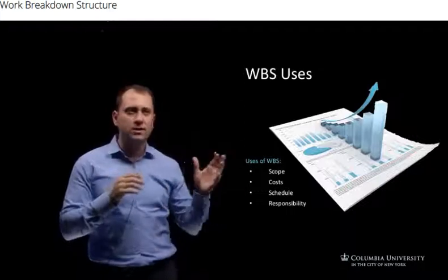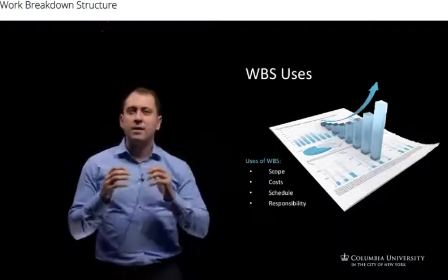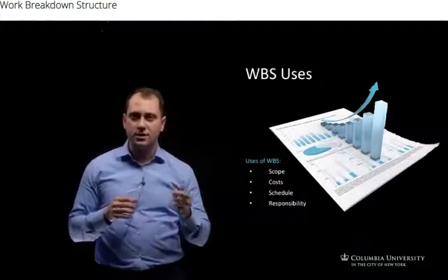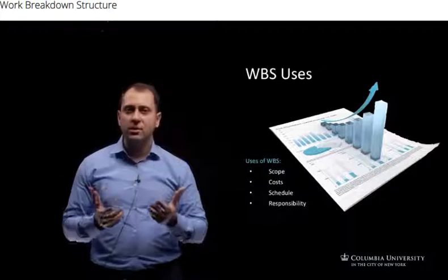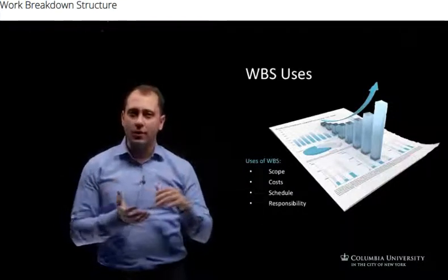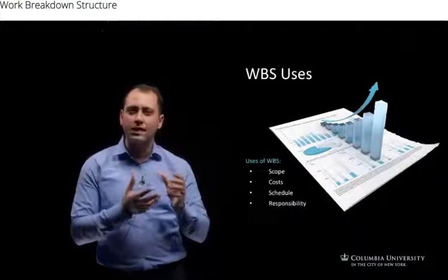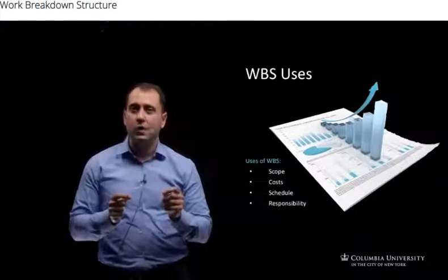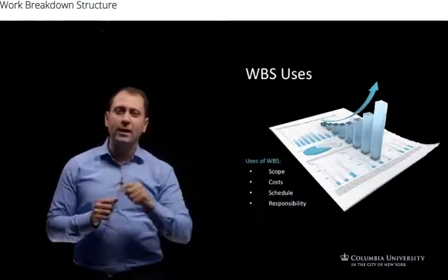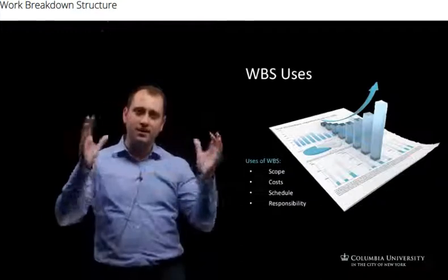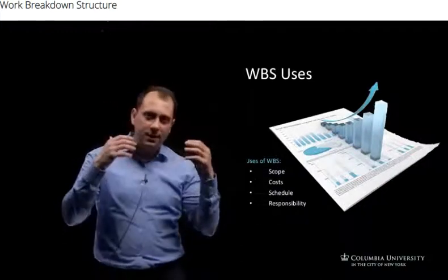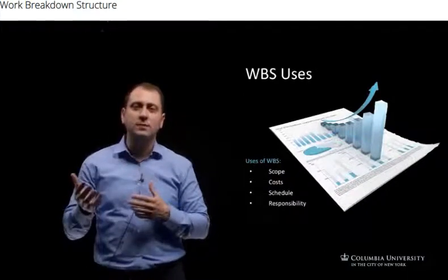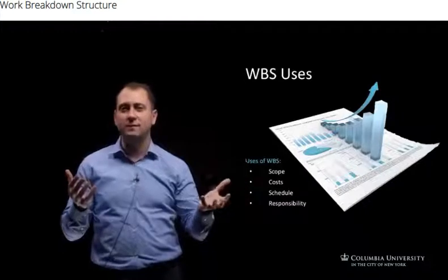And speaking of schedule, let's go to number 3 here. The WBS is also important when it comes to tracking the progress of a construction schedule. A project manager or construction manager can track progress by defining the percent completion of each work package, because remember, it's measurable. When added up, it will help identify the progress of the entire project. Have we finished 30% of the project, 40%? How do we compare the actual with the plans we have, and so on?